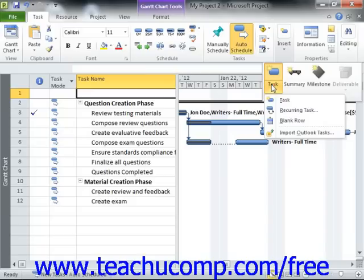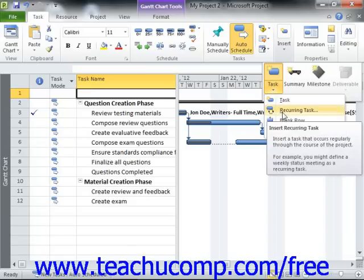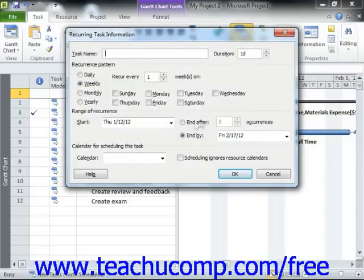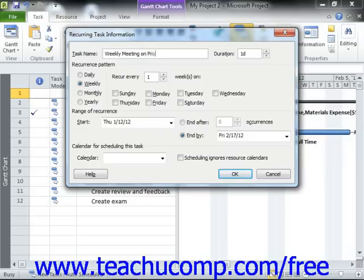From the drop-down menu that appears, select the Recurring Task command in order to open the Recurring Task Information dialog box. First, type a name for the task into the Task Name field. Next, input the duration of the recurring task in the adjacent Duration field.